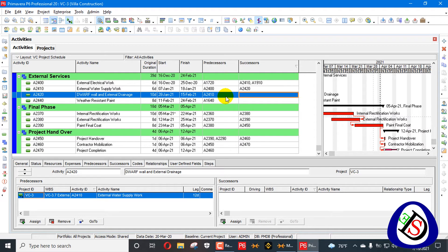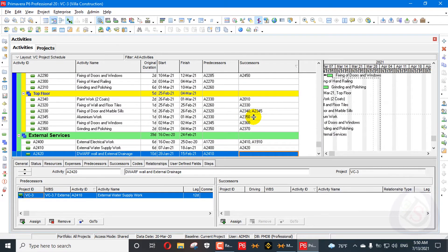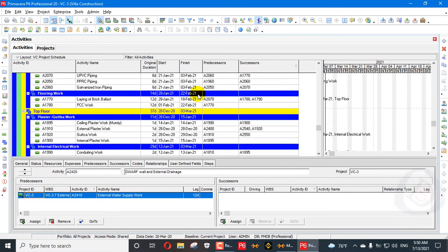An activity without a successor or predecessor is a dangling activity. During critical path analysis, an empty area, empty relationship, or empty successor means the activity is dangling. So how can we find activities having no predecessor or no successor?